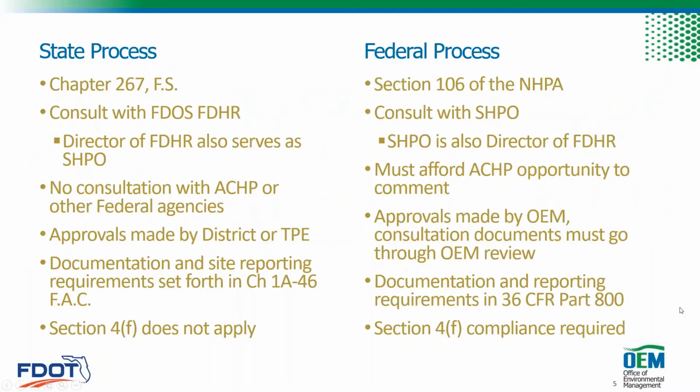So, like I said, our state-funded only projects follow Chapter 267, and our federal projects have to comply with Section 106. Under 267, the department consults with the Florida Department of State Division of Historical Resources, or DHR, and for federal projects, we consult with the State Historic Preservation Officer, or SHPO. Thankfully for us, the director of DHR also serves as the Florida SHPO.